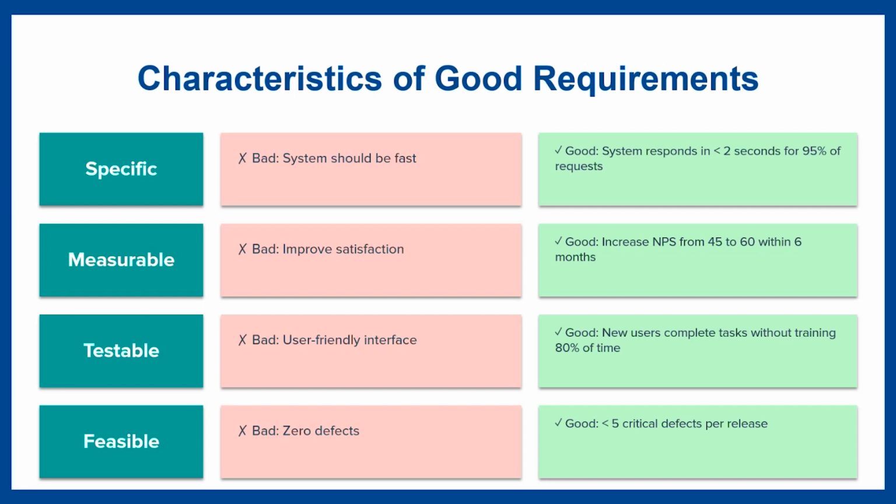The last good requirement is testability. You must be able to prove the requirement has been implemented correctly. This means the requirement should be written in a way that allows for testing, validation, and inspection.